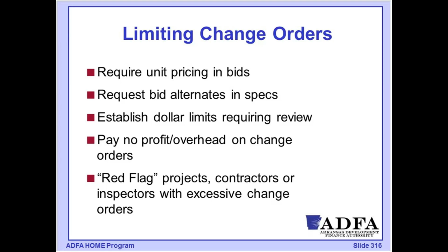What we're trying to prevent from happening here is that, of course, in a case where we have a competitive procurement, the contractor that has gotten this job has gotten it by really controlling costs. And in some cases, that contractor is then going to try to either recoup when they bid too low or increase their profitability by executing as many change orders on the project as possible.